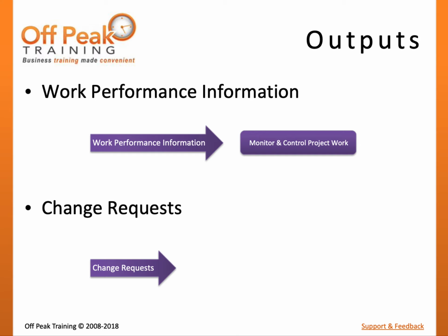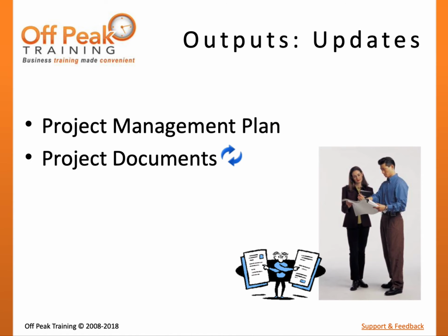Change requests may be issued by the project management team to help correct projects needing improvement or to prevent performance issues in the future. This may trigger an iteration of the plan communication management or managed communications processes. The monitor communications process may also create additional project documentation and updates. This may include updating the communications or stakeholder management plans, the issue log, or project records and lessons learned documentation.